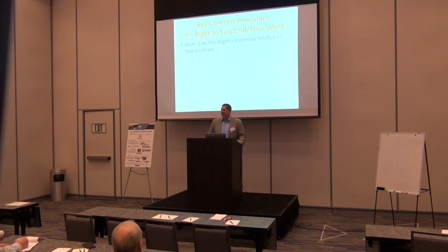And if I don't get paid within that number of days, I send a notice. And if that's not cured within 5 days or whatever, I have the right to suspend operations and stop work. Because you want that in there. That's your leverage. That way you're just following the contract and doing exactly what's in there. Without something like that, you're at risk on whether or not you can do it. You might be right, but you might be wrong. And that's a big risk to take.